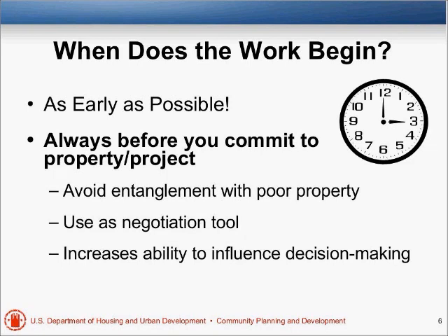I can't tell you how many projects I've been involved in where some developer had a housing project that they put together, they have working plans and specs, and then their mortgage banker told them, well, we're going to have to get government financing. And at that point, they started thinking about, oops, we got to do an environmental process. Well, if somebody has working plans or specs, they're not going to want to change anything. And they just want to go through a meaningless paper sign-off, and they're really not willing to look honestly and say, are there any environmental issues, and what are we going to do about them?